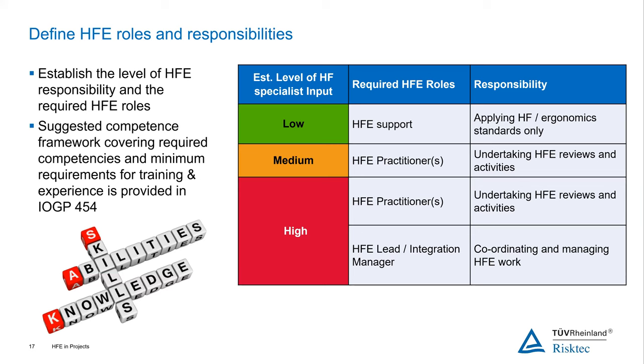So what the IOGP 454 has in it is a suggested competence framework for these types of roles. And what that does is give an idea of what the required competences would be for these roles and what the minimum requirements would be for training and for the number of years experience you would have. And again, it can't be definitive, but it's been discussed with the human factors professionals in industry, and it's believed to be a reasonable framework that you can use to look at the inputs that you need. And that helps you define, for those roles, what their responsibilities will be on a project.